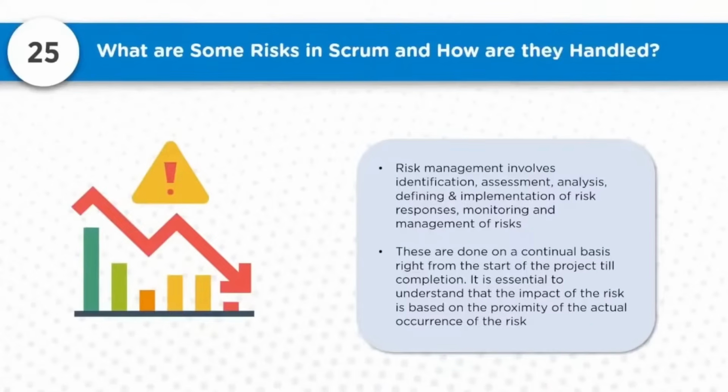So depending on the impact and probability of a risk, if it is a high impact risk, obviously you are required to do both qualitative and quantitative analysis. If it is a simple one with very little impact, you can take the call accordingly on to what extent you may require to analyze it and have response plans for it. Once you have defined and implemented the response plans, quite obviously, you should keep monitoring and managing the risks.